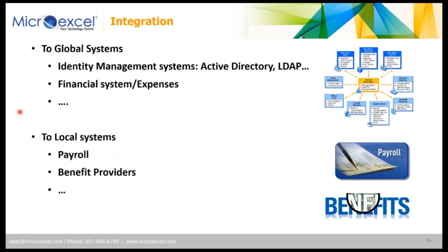If you are not using Employee Central, it's the opposite. It's going to be the reverse. We're going to take the data from your payroll system and push it into what we call the employee basic info or the employee profile to make sure you can use the other modules around it. So depending on what systems and what modules you're going to put in place for your global rollout, the strategy of integrating the data will be different, either one way or the other.